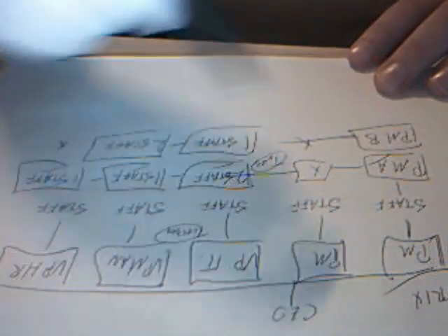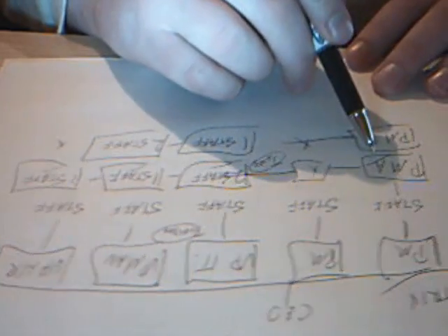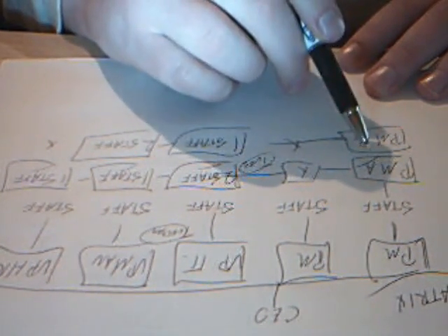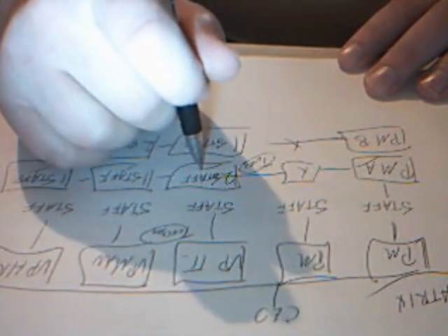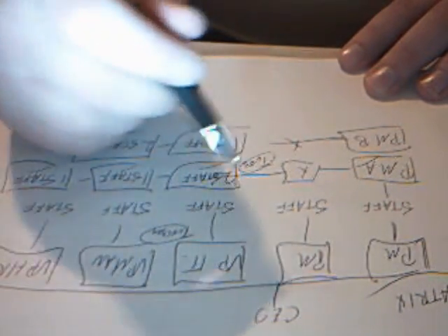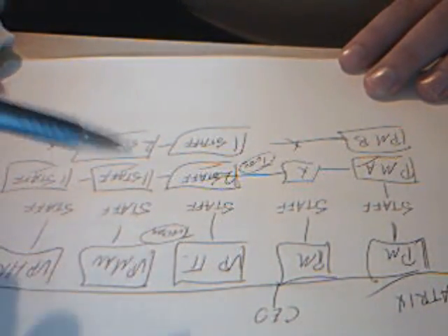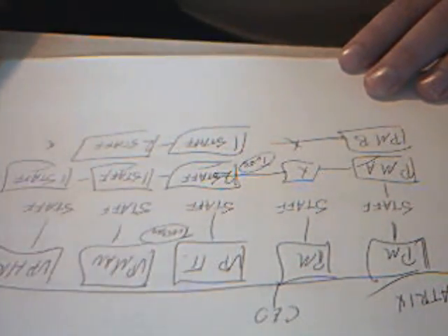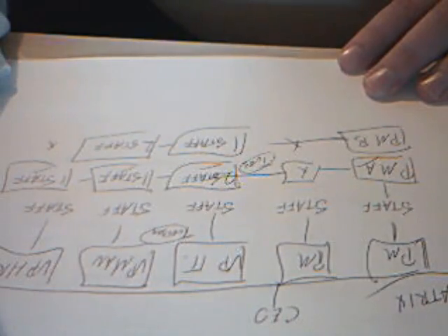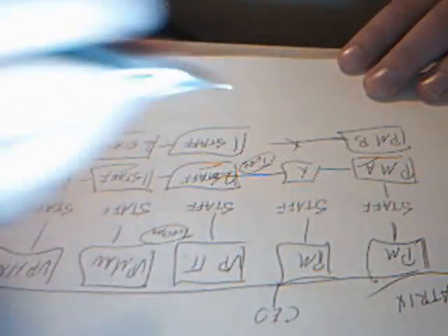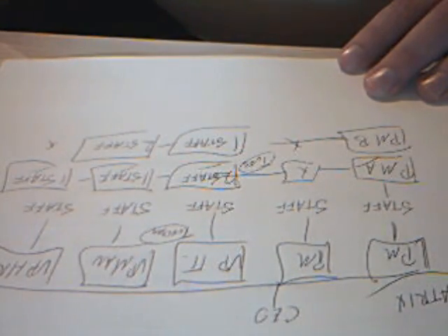So what happens in cases where the project manager isn't given the resources or the authority to control his resources is his project gets pushed way out behind schedule. Missing a milestone, missing project dates, not only will it mess up that one day, we'll look later in the course where you'll see missing a milestone or pushing back dates can have disastrous effects throughout the remaining life of the project.